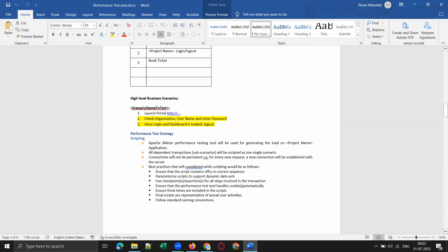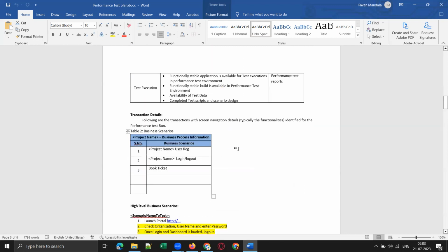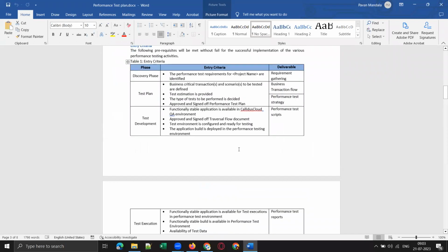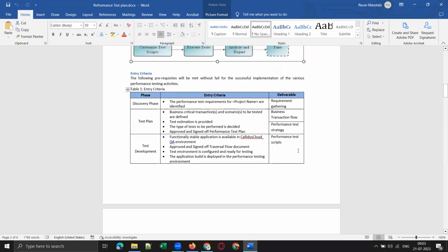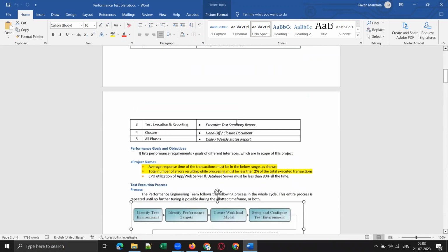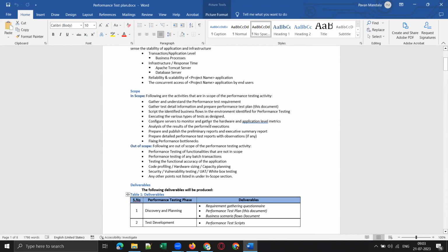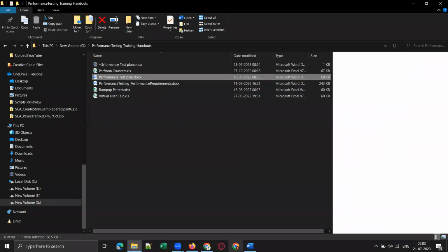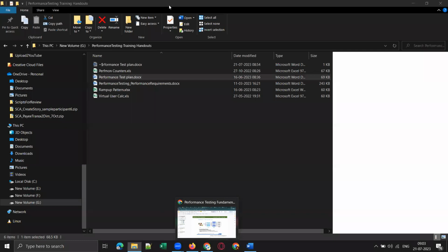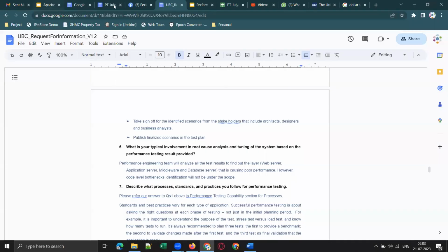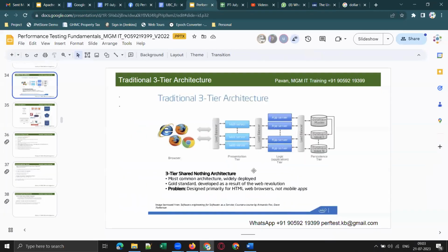Yes. So we should get a formal approval from the client saying that yes, this is what we are expecting. If anything is done beyond this test plan once the project is started, we can charge them an additional amount to achieve that. But we should have a formal approval from the client, and that is called sign off. We should get a sign off from the client in the form of an email. So tomorrow they cannot say that this is not what I expected, because they approved it over email.